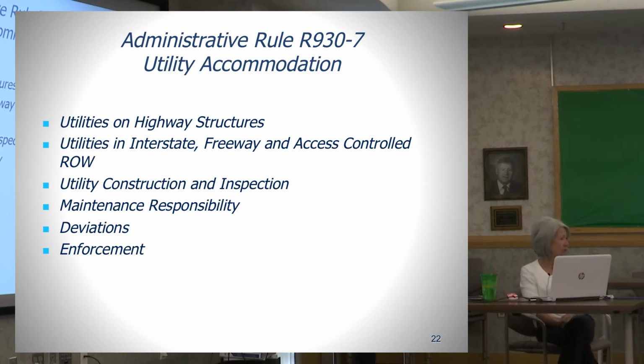The Structures Division prefers to evaluate any time a major utility is being installed within 50 feet of a structure, the foundation of a structure. It's a good idea to check in with them and make sure that they're aware of it.